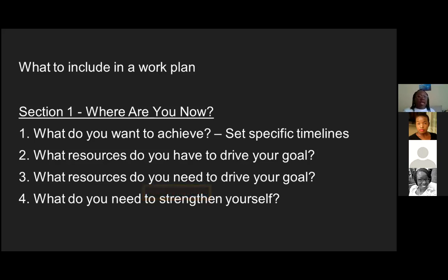manageable timelines. And then what are the resources that you require? Answer that question. When you start breaking down the goals into smaller manageable pieces, you start understanding what is the resource that I require in January? What is the resource that I require in December?